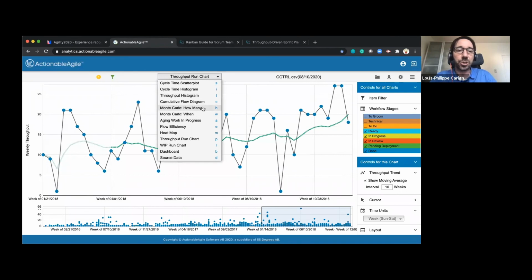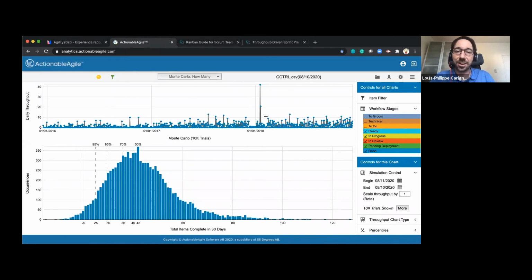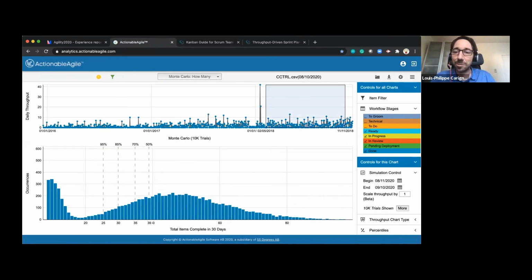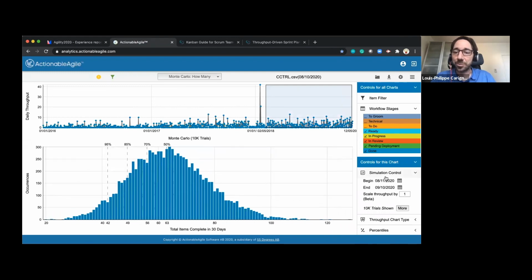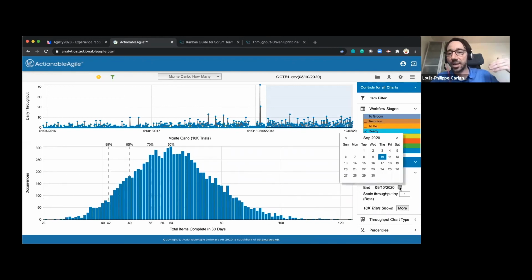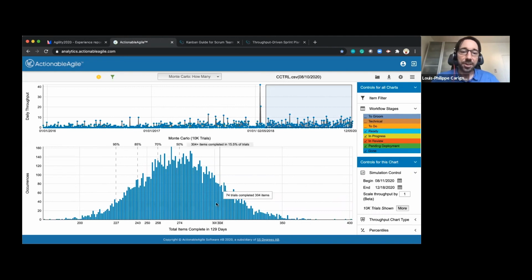So we're going to do some Monte Carlo simulation in there. I'm going to pick my same timeline here at the top. From August 11th, for my release planning, my release is going to be in 3 months, at the end of December, just before the holidays, on Friday the 18th. And I've got 10,000 trials or simulations based on that throughput.